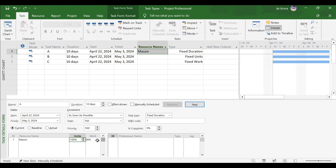Work is shown as 80 hours. Work is nothing but duration multiplied by units — man hours or man days. Multiplying 10 days by 1 gives 10 man days, or in hours, 80 multiplied by 1 gives 80 man hours. If two Masons are assigned at 200%, work would ideally be 160 man hours.